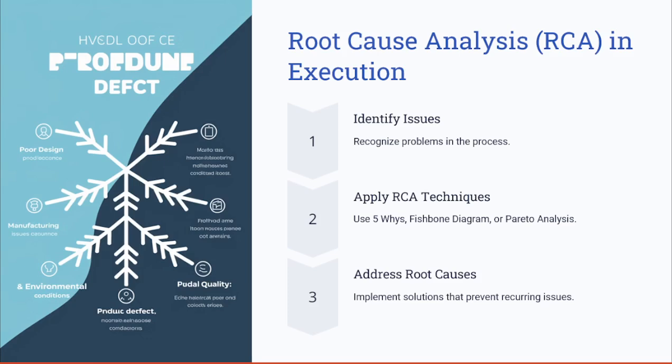There are some common techniques used when doing root cause analysis. The first technique is the five whys, where you start understanding the problem in a better, more detailed discovery by asking the same question five times.